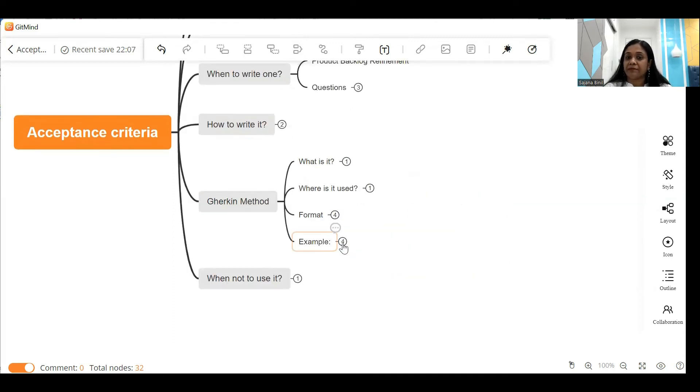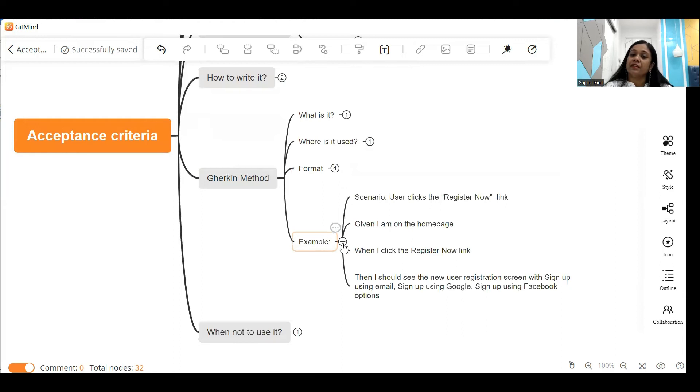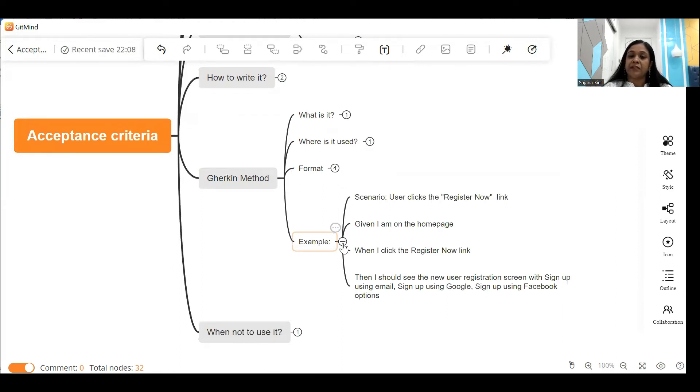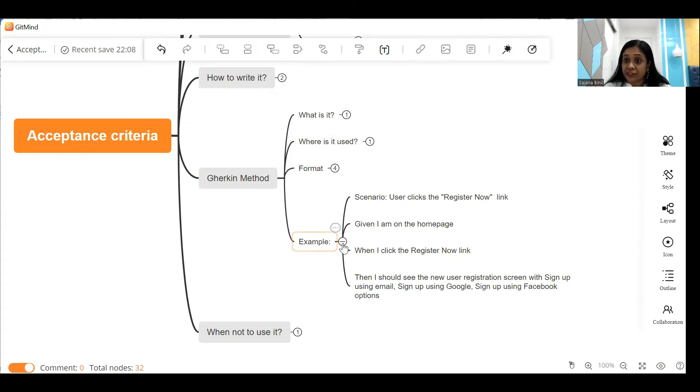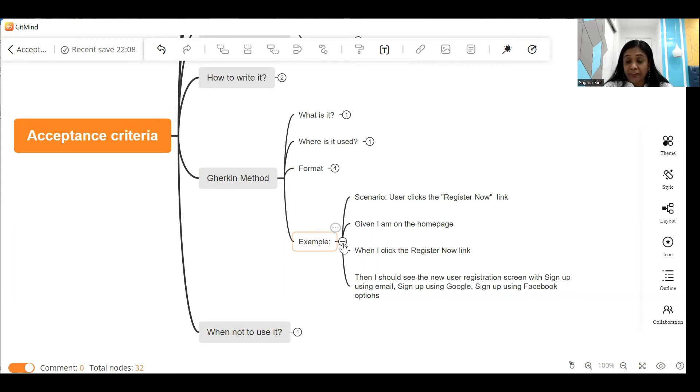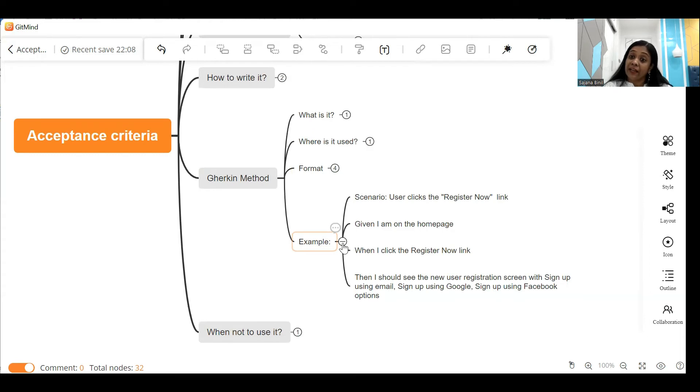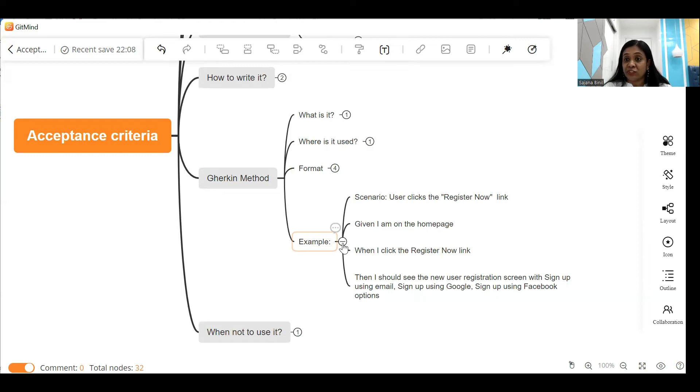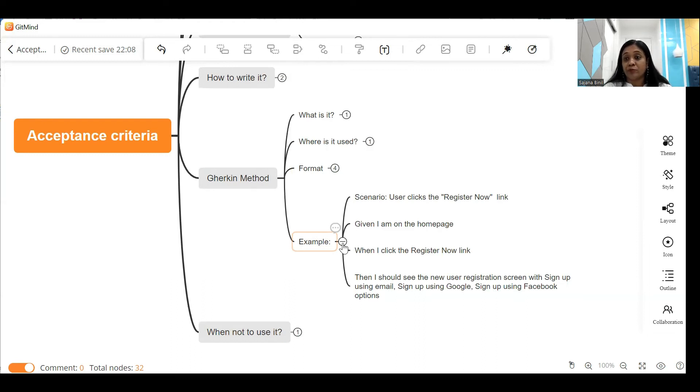Now let's look at this with the help of an example. So I've taken the example of a user clicking on the register now link. So our scenario becomes: user clicks the register now link. Given I am on the home page - that is the precondition. When I click on the register now link, then I should see the new user registration screen with a sign up using email, sign up using Google, sign up using Facebook option.